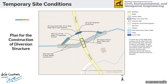This is the plan drawing for those temporary conditions — everything drawn out that Matthew and Elijah talked about. The blue boxes with the crosshatch pattern are our trapezoidal channels, which come out to be about 54 feet wide at the top depending on the surface elevation. That will all be lined with geotextile fabric and riprap, coming out to about 960 square yards. The dark blue box under the road is our culvert path: a 70-foot-long culvert path with 35 feet on either side of the road centerline, with three seven-foot diameter corrugated plastic culverts covered by a temporary gravel road. The Silver River channel will also be lined with 500 linear feet of straw wattles and silt fence for erosion control.